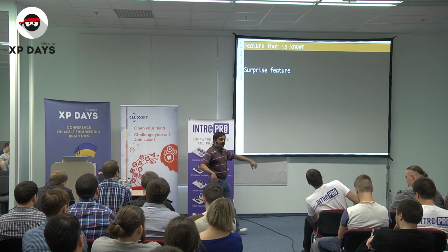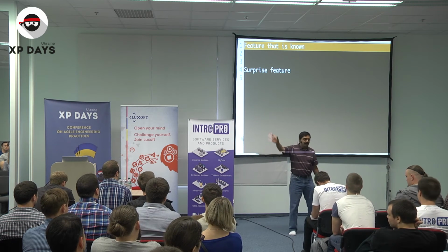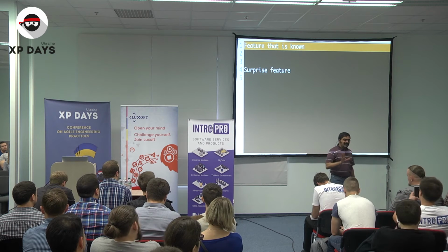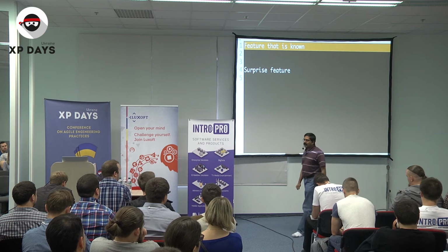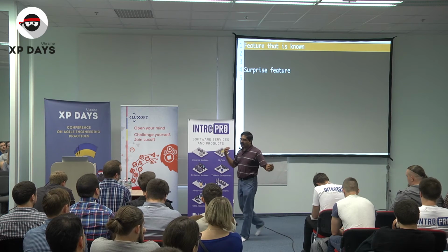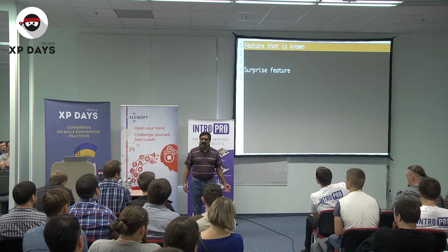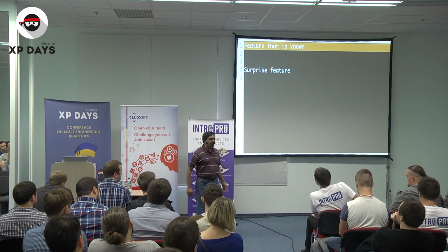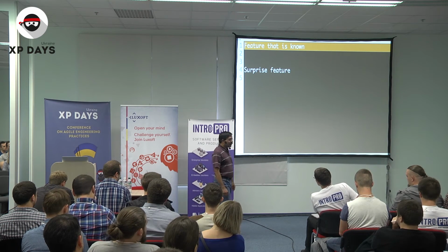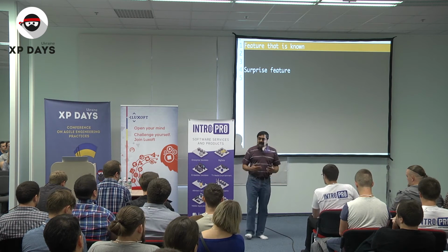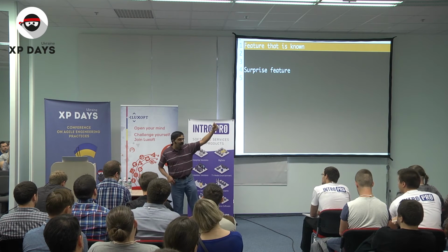So we have, let's say, about 10 sprints on our hand. And every sprint we are adding feature and adding feature. And now we are in the 7th sprint and we have taken a feature to implement and we suddenly realize, oh my gosh, this architecture will not support this feature. We are in trouble. We got to change a lot of stuff and the sprint cannot finish anymore. We need 4 more sprints to rework the architecture. Well, that's one risk we're going to get into, a feature that is known on the project.